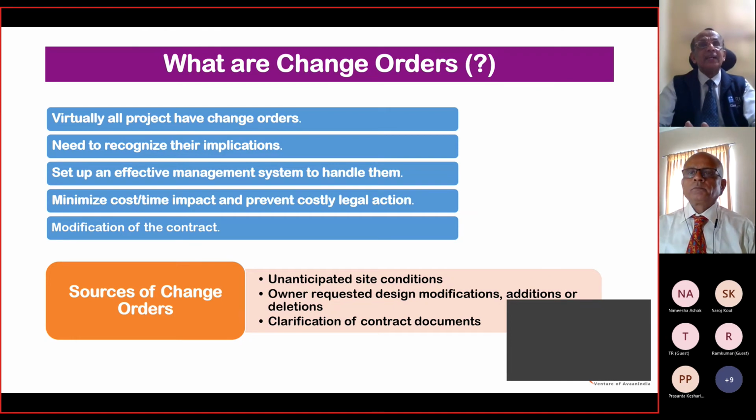And by any chance, listen carefully, this is the catch. If it does not happen and the ultimate consignee is obliged to pay customs duty, it will be back charged to the vendor. Please understand. So how important these sort of instructions are, and if you do not comply, you can get back charged.